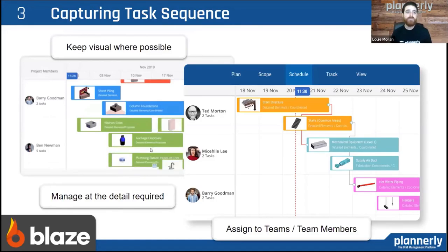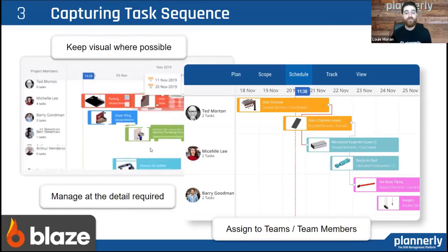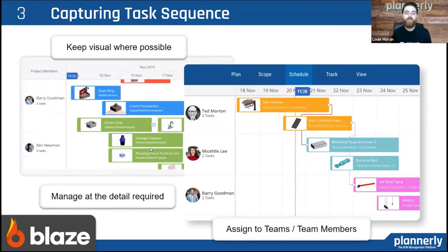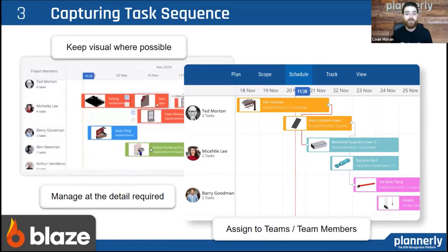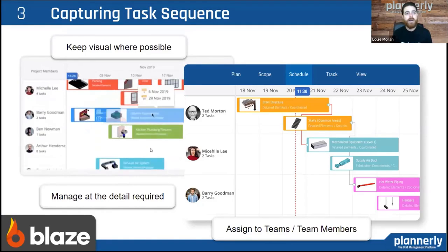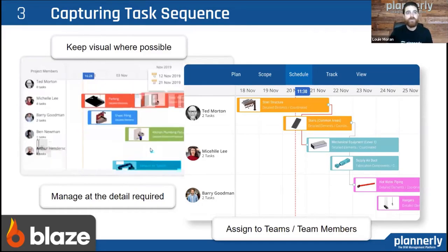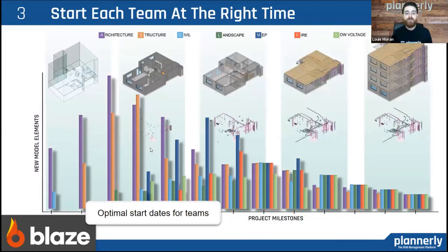So in the scope, we captured all of those tasks as requirements for coordination. Let's schedule them. Understand who's modeling, what teams are involved, and what the actual component is that you're modeling. It'll be a lot easier to manage the responsibilities throughout. Use smaller bite-sized deliverables, maybe once a week instead of once a month. You can catch issues a lot more quickly as they come, instead of waiting until all of these issues have been added up over a period of time.